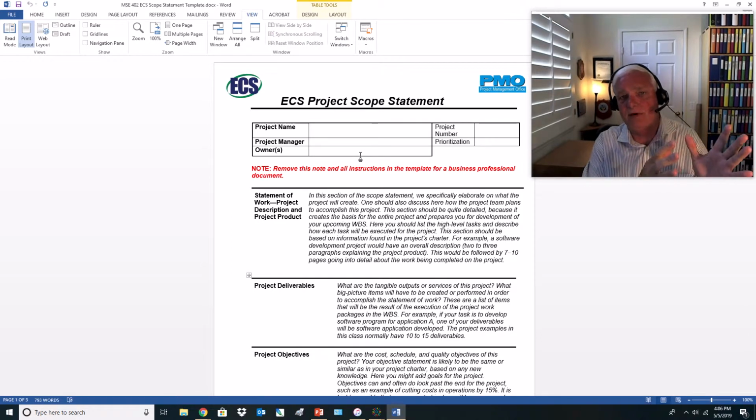I'll call it that process flow that we've been talking about. This document flows out of the project charter. It's the scope statement. It's going to flow to next week's assignment for the WBS structure, the work breakdown structure. Your work breakdown structure will be a direct reflection of this. It'll almost mirror the information that's in here, or need to mirror it. And ultimately, once you finish the work breakdown structure, then we go into goals and objectives, tasks, subtasks.